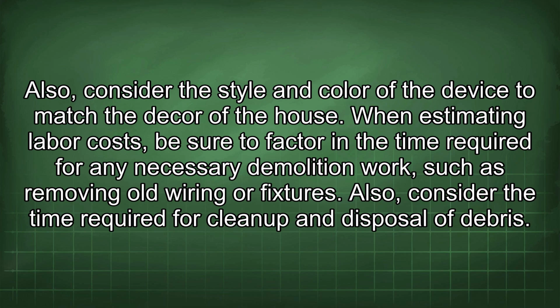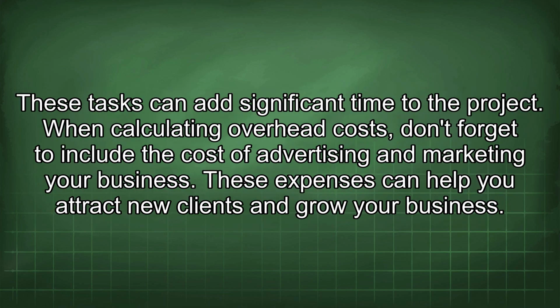When estimating labor costs, be sure to factor in the time required for any necessary demolition work, such as removing old wiring or fixtures. Also, consider the time required for cleanup and disposal of debris. These tasks can add significant time to the project.